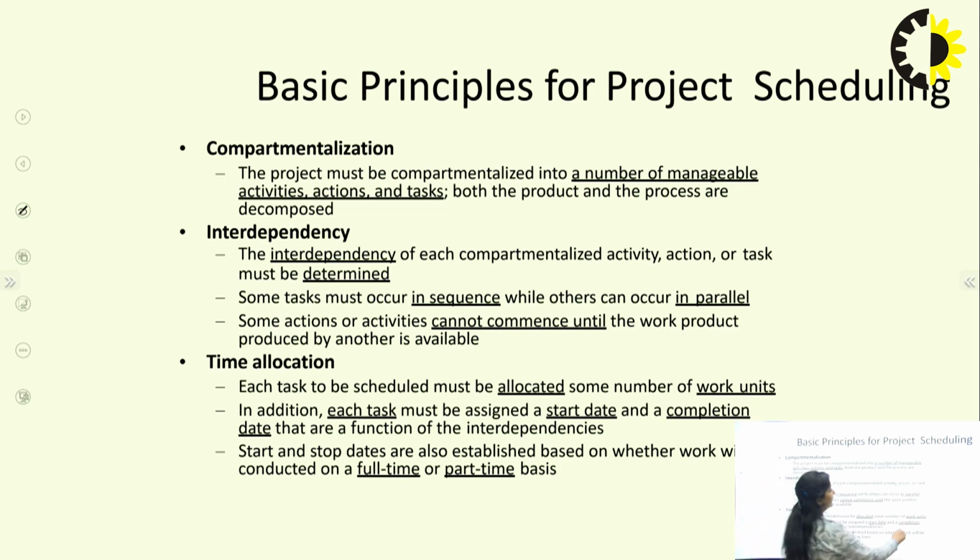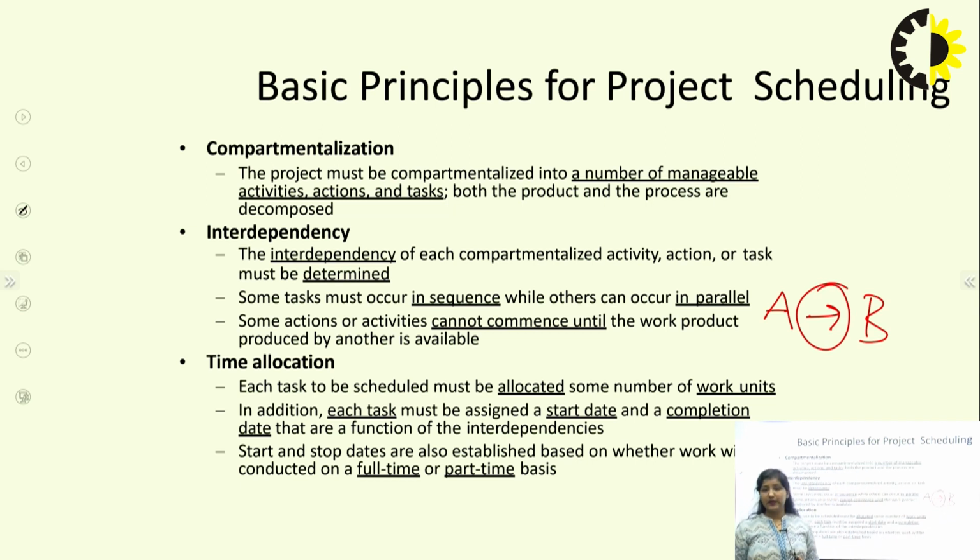Suppose we have activity A to B. So what does this mean? This means that activity B cannot be started until activity A has been completed.